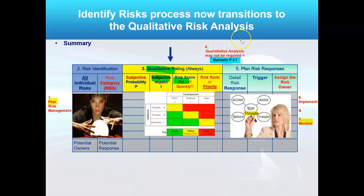For a few risks, quantitative risk analysis would be required — much more intensive, way beyond this conversation. I would offer to the company to ask for their support or guidance on those big items. The really big risks should get quantitative analysis — something with a big probability and probably a big impact. If it doesn't have a big probability or a big impact, I wouldn't touch it with quantitative — not worth the time.